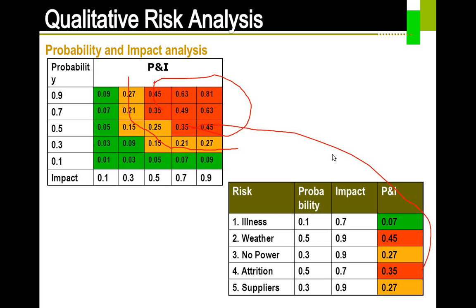However, the impact is going to be quite high even in this scenario. If I say the probability of the building collapsing is 0.01, the impact is very high, if at all it does, 0.9. If we multiply these two, I would still be somewhere here. That is the reason we all come to the office and sit in the building, and we are not much worried about these things. So that's how it can be done and analyzed.